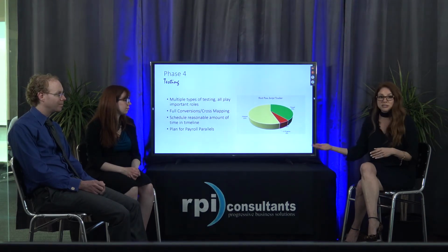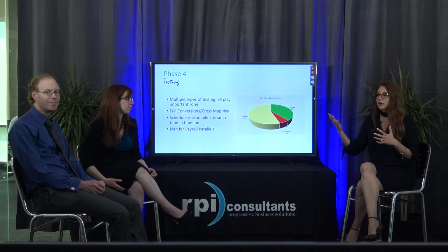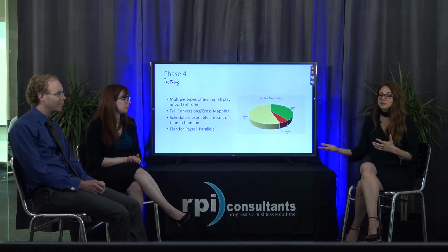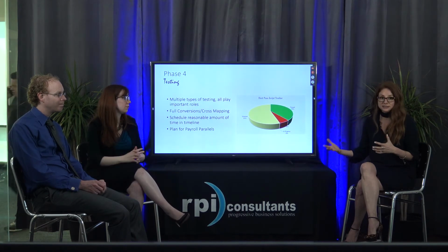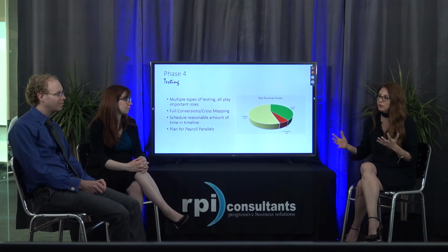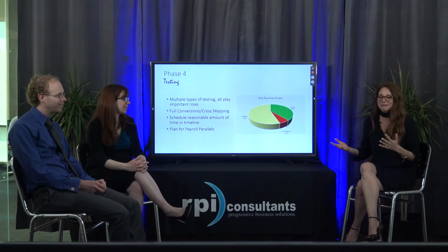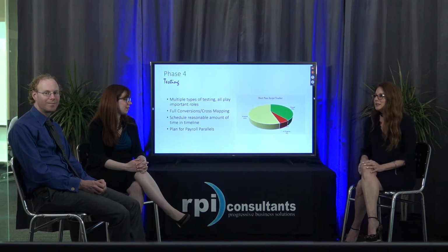Your conversions must be done by this system integrated test. All of your true data should be in there. Your interface development theoretically should be done by this point, so you can test that as well, any of those triggers. And reporting, reporting is always the last guy to get done, so we know that it's in play.